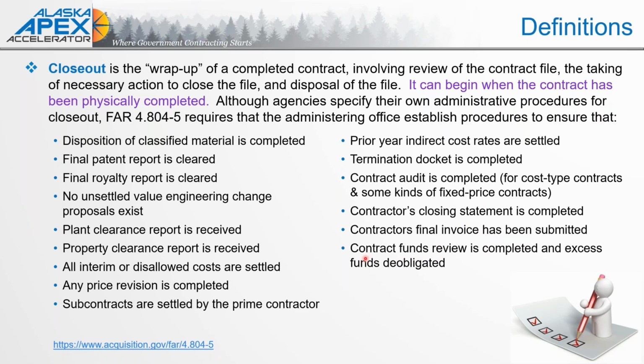And when we talk about that last step, this last bullet, the contract funds reviews completed, excess funds deobligated. So this is where you should be looking at your own accounting system, one, to make sure that there has been no excess payments, that you haven't been overpaid, underpaid, and looking at, is there truly excess funds on the contract that should be deobligated?